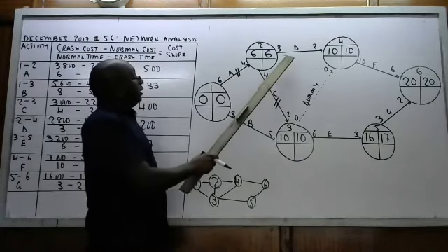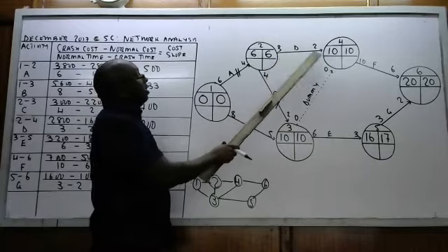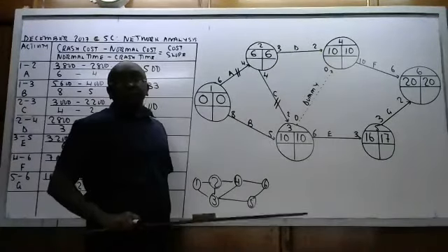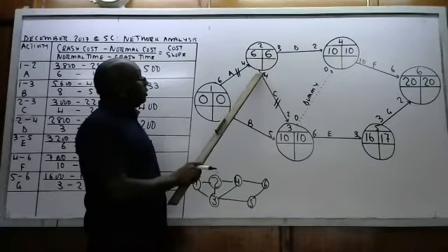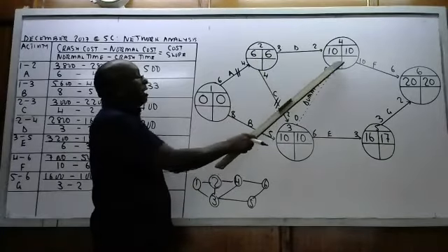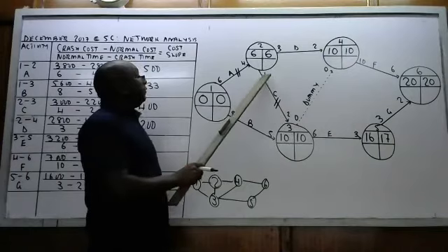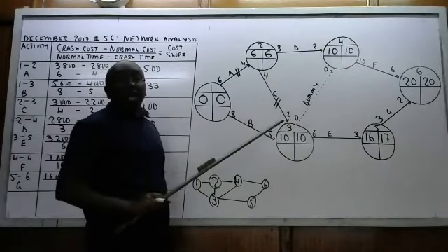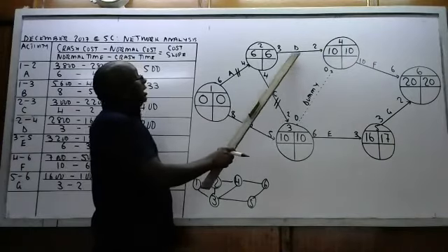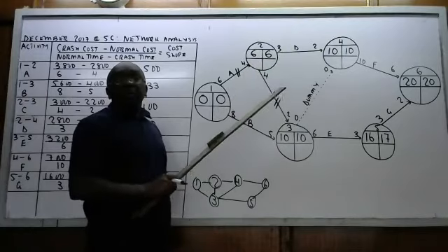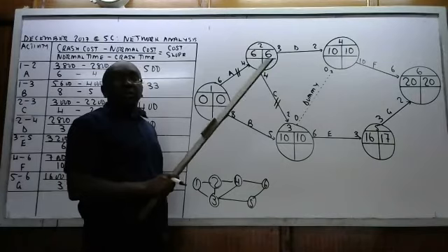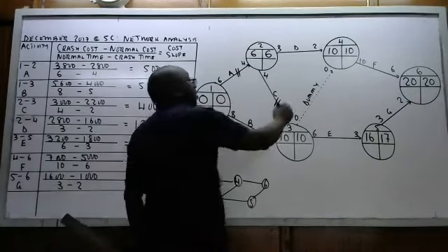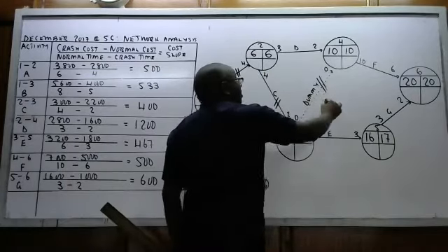Then we come here. You find that D also satisfies. So again, you are supposed to check from here. If a person was to follow this route and then to come there, it will take them 4 plus 0, that is 4 days. Through D, it will take 3 days. So 3 is shorter, and therefore D is not critical. So the critical one is this dummy.